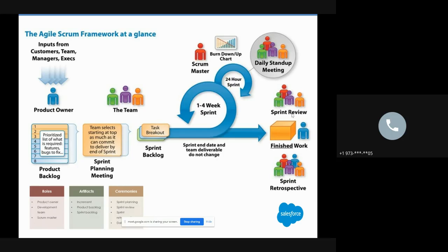So then in the sprint review, we look at what work is completed, right? And we show off that, and that's when the business decides, okay, this is something shippable, this is something we can move to the release, right? So that's the purpose of the sprint review meeting. It says finish work, right? The whole idea of agile, like we talked about, is to have completed software, but it should be working and efficient, right? Then next, after the sprint review, is the sprint retrospective, right?